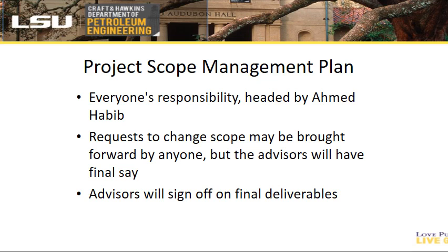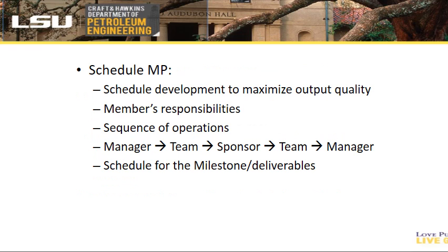The Project Scope Management Plan is everybody's responsibility, but it will be headed by Ahmed Habib. Requests to change the scope may be brought forward by anyone, but the advisors will have the final say, and advisors will sign off on final deliverables.